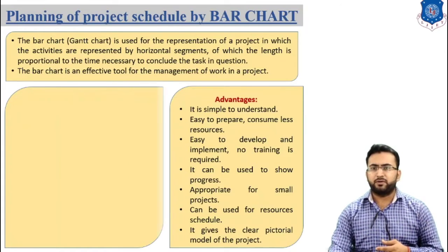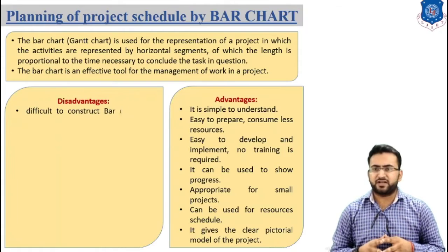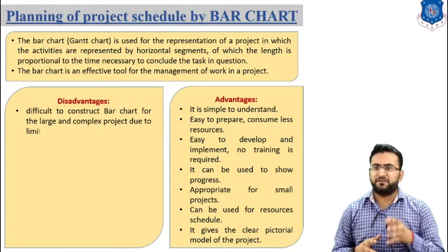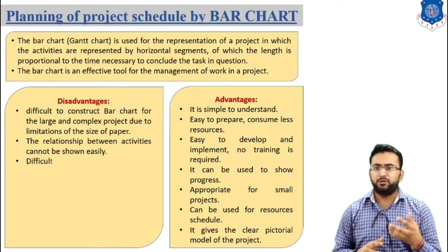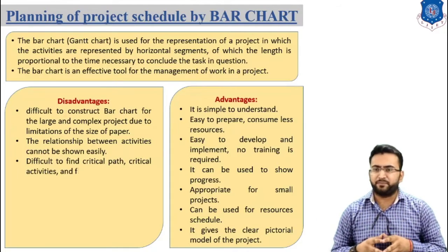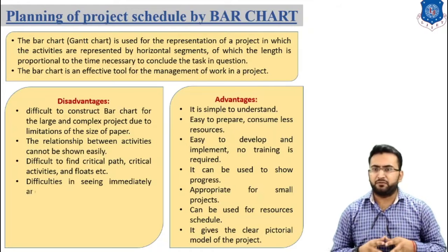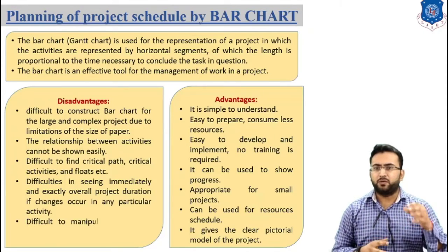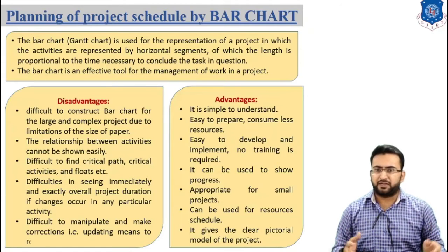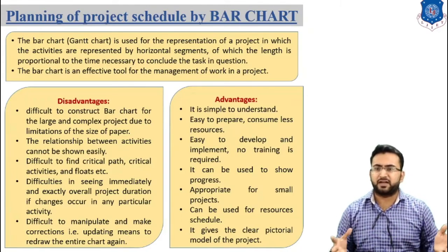Now let's talk about various disadvantages of the bar chart. It is difficult to construct a bar chart for a large and complex project due to the limitation of paper size. The relationship between activities cannot be shown easily. It is difficult to find the critical path, critical activities and float in the bar chart.